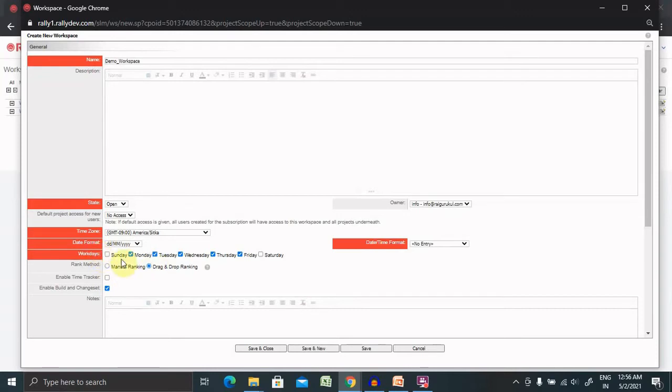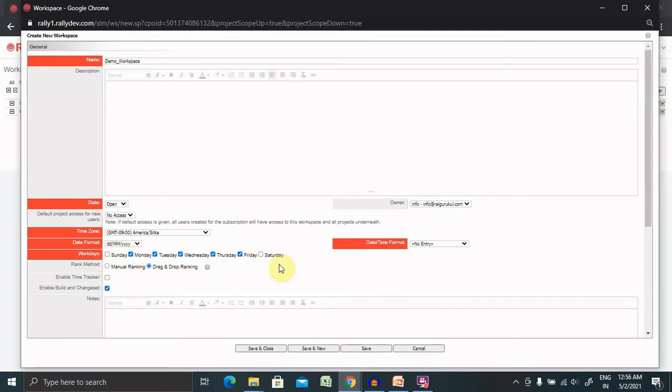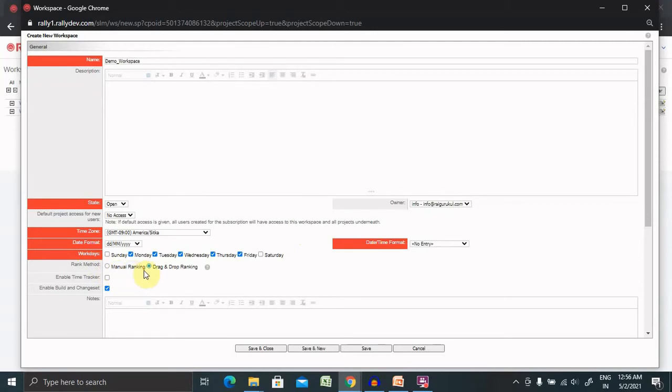This is for your organization work culture. If you have a five day working cycle select only five days Monday to Friday and set Sunday as a holiday. This is going to help you in sprint planning or capacity planning. Then if you want to do rank method like manual ranking or drag and drop ranking you can select whatever options you are comfortable with.